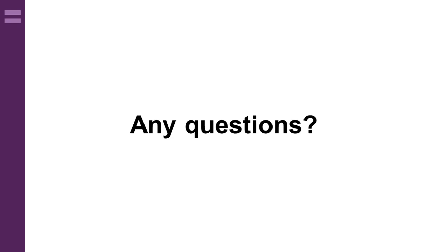So, one more quick question, please, if we may. How would you scale a PID for different projects in terms of amount of work, number of people involved, the cost, the length of time required, and the level of risk? Yeah, I mean, that is exactly how you scale the PID, is the level of risk, the size of the project, the cost in terms of people involved and the costs, and the length of time. So obviously, the longer the project, the more people involved, the higher the cost, or the higher the risk, then the more detailed and the longer the PID would need to be.